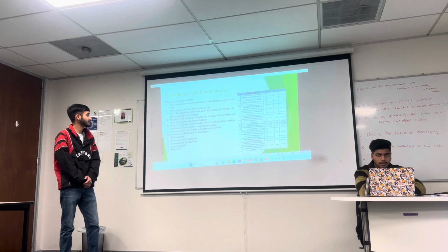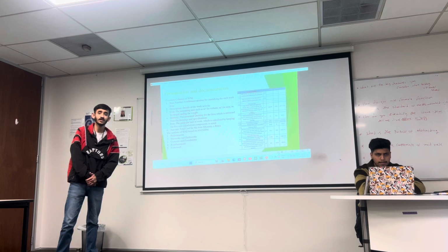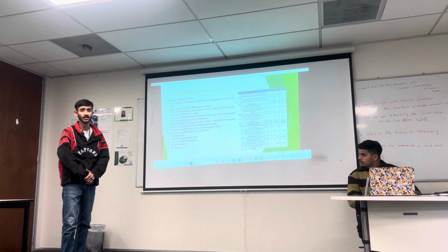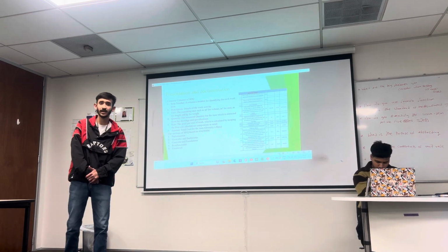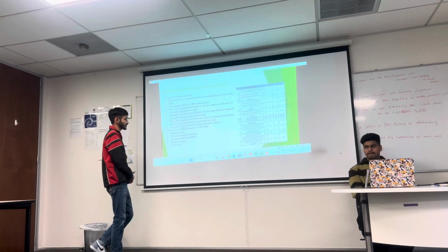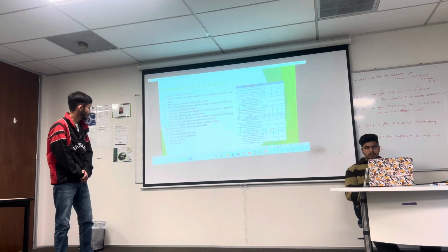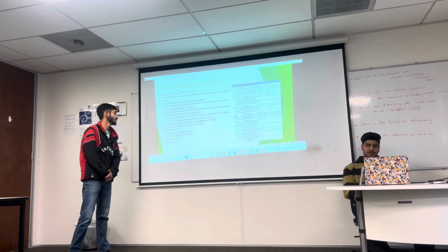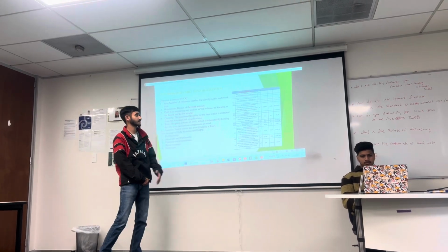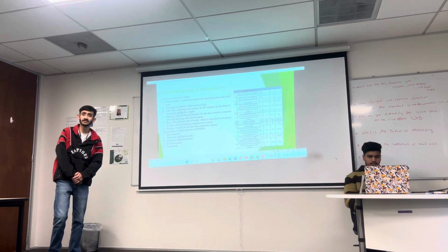And rate, the price per unit of work, which is calculated by keeping the 5 cost calculation components in mind, which we studied earlier. And number 6 is the amount, the total cost for the item, which we calculate by multiplying the quantity with the rate. They also mention the 5 sections of the SOQ, which are also based on the Australia New Zealand Standard Method of Measurement, which are preliminaries, site works and earthworks, like here's an example explaining site works, then concrete and foundations, then reinforcement, and lastly the formwork.